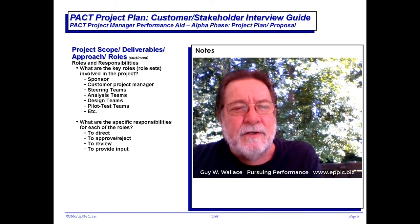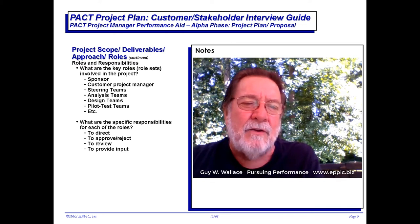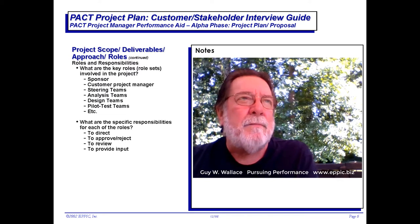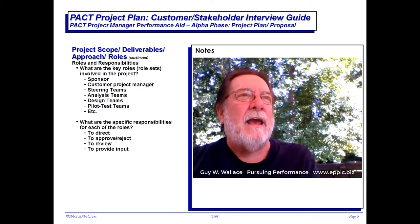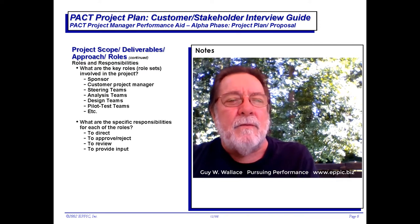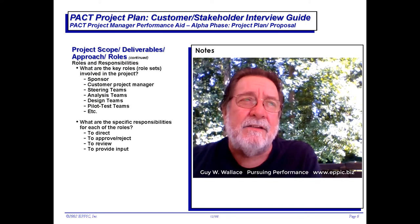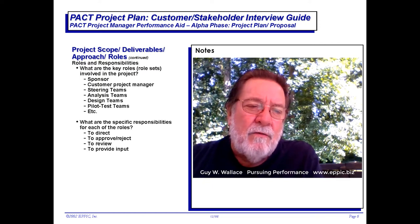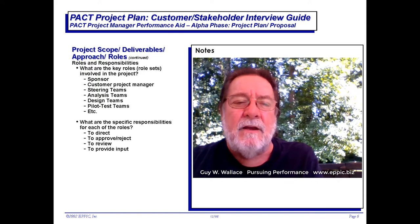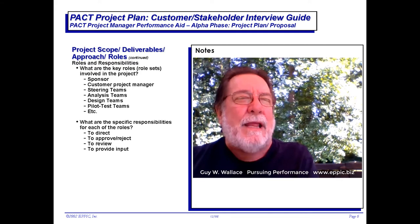The next page covers project scope, deliverables, approach, and roles. Now we can ask: who are the sponsors? Who will be the project manager? Who might be on a project steering team, or on analysis and design teams if we're taking a team approach? Or has that been excluded, and we're going to meet with master performers and subject matter experts one-on-one individually? We need to understand that. Who is going to be directing, approving, rejecting? Who is going to review, and who is going to provide input?